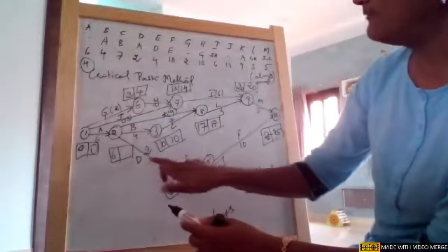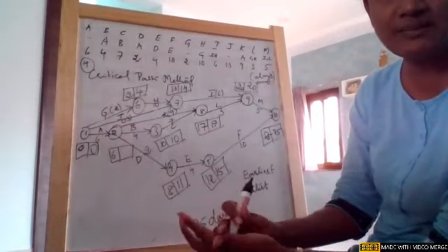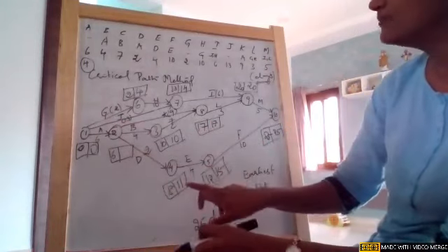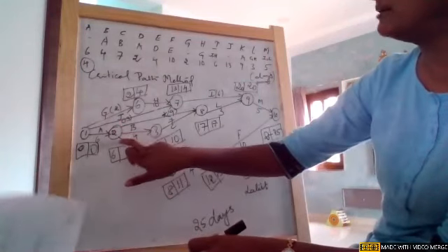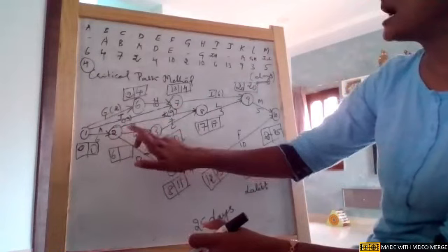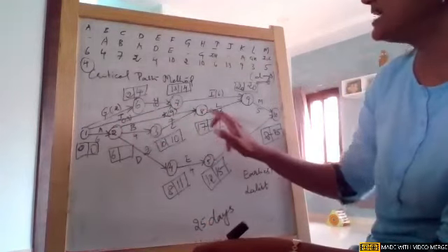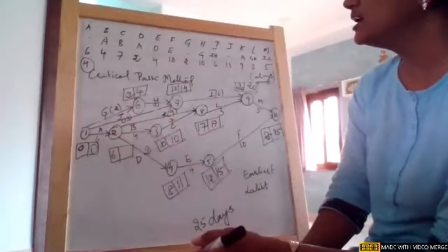So you see 11, there are 3 tails. So 3 values are coming out of 3, and whichever is minimum will be the latest at node 2. So 11 minus 2 is 9. One tail is giving 9. 10 minus 4 is 6. One is 9, one is 6. And the third tail is 17 minus 9, which is also 6.